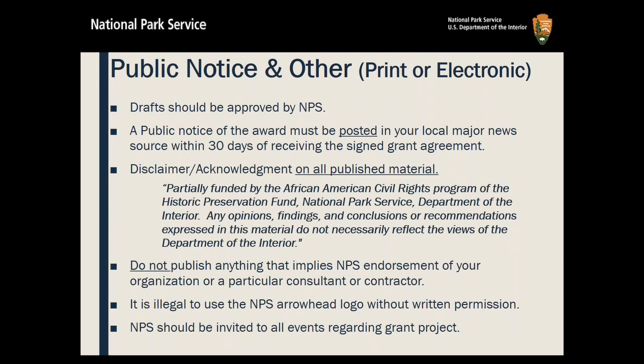It actually has to be posted into a major area news source, which is typically your biggest newspaper. And it just has to have information that you were awarded the Save America's Treasures grant through the National Park Service for whatever amount it was to do whatever the project is. And then it has to have contact information for your organization so that anyone in the public with questions can contact you.